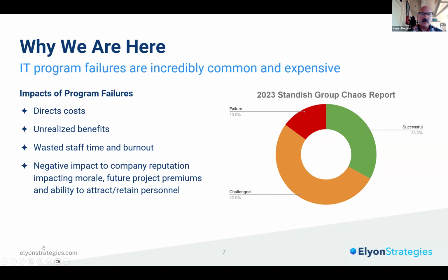They had what appeared to be fairly weak contract specifications, requirements that were too generic, as I understood, a lack of customized specifications tailored to the application needs for the state of Idaho, and probably insufficient oversight as well, from what I could see.